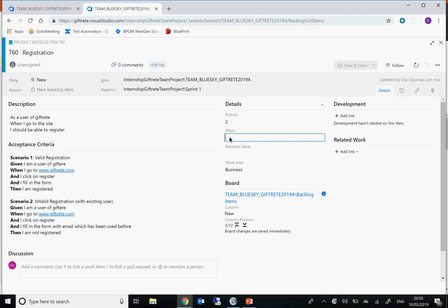They will ask everyone to estimate. The tester will put their own card up, the developer will put their own card up. It's possible that one will say 3, another one will say 5, another person will say 21. They will ask the person that said 21, why did you say 21? And the person will say, oh, because it is so repetitive.